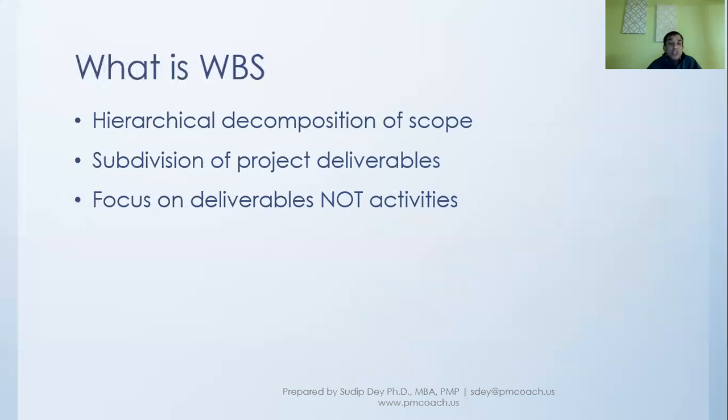Our focus is on deliverables, or the work content, and not on what activities are required for this work content. That is the important thing to remember at this point.